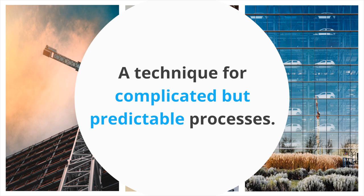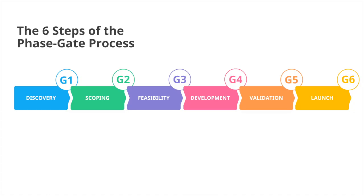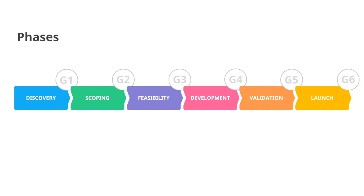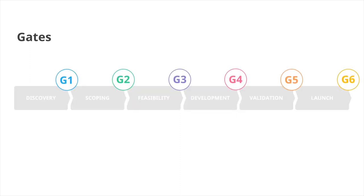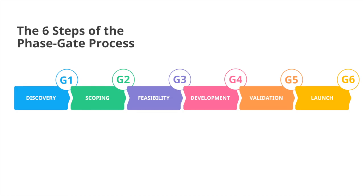Common examples of industries where the process is used include the pharmaceutical sector, construction industry, and electronics manufacturing. The phase gate process is comprised of six distinct steps called phases and six post-phase review steps called gates. While the process can be adapted to different company needs — with fewer or more phases and gates — the traditional approach always starts with a discovery phase and ends with a post-launch review gate.